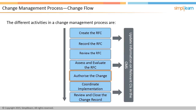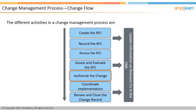The changes are authorized by the change manager. The change requester, in turn, will ensure that they have the approval in the following three areas: Financial — what is it going to cost and what is the cost of not doing it? Business — what are the consequences to the business both of implementing and not implementing the change? And Technology — what are the consequences to IT infrastructure? Following this, change management coordinates the work performed with multiple checkpoints and forwards approved changes to the relevant product experts to build and test the changes and create and deploy releases.